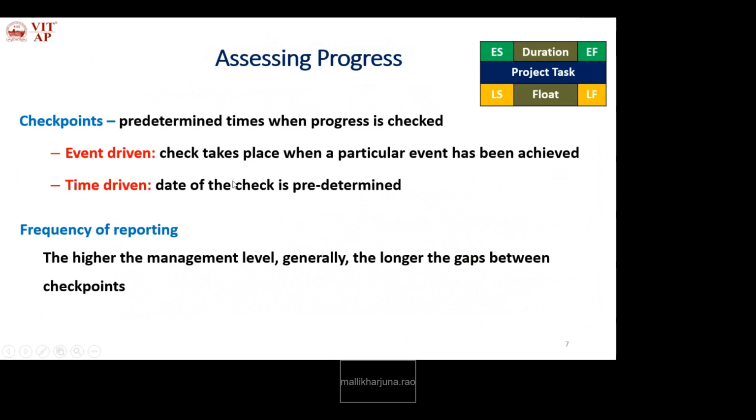Okay, and preparing a report, that is frequency of reporting. The higher the management level, generally the longer the gaps between checkpoints. So it depends on the project type, small scale, medium scale and large scale projects, we will prepare the report.